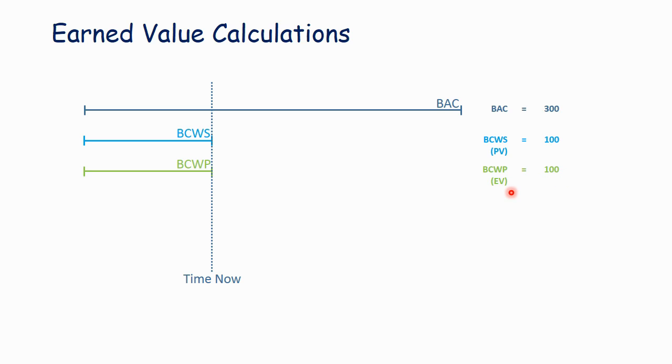Now in the new nomenclature, this metric is called earned value, which I think is more intuitive. This is the amount of value that you earned on the project when you did work. And it's the budgeted value. It's not the actual value. So with these two metrics, we can see whether we're on schedule or not. Now graphically, you can see that we were scheduled to do this much work. We performed this much work. This project's on schedule.